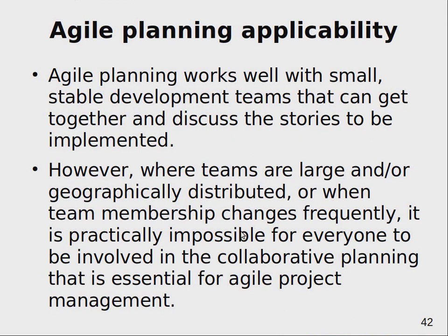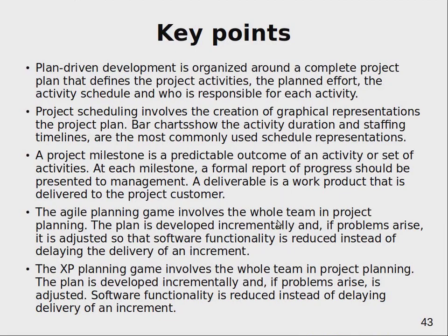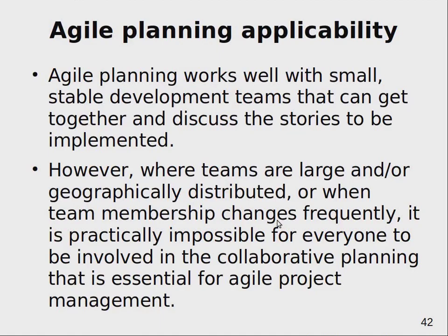And also it depends on the consistency of your team. Agile works in consistent teams where everybody is more or less equal in terms of skills, experience, etc. But if you have senior members of the team and junior, then probably it's always better that the senior members do planning in advance, because junior members may not be skilled enough to make realistic plans.